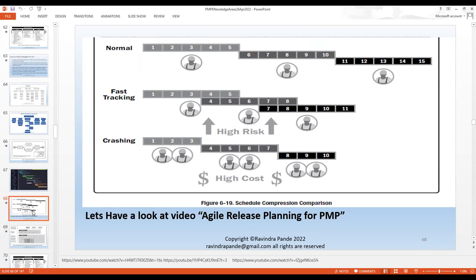Crashing means you add multiple resources so that the task gets completed in half the time theoretically — practically it will get compressed about 30 to 35 percent. Why less? Because even new resources on board take time to learn, get access to the team, understand how ports are deployed and how the product will be released. They may eat into the efficiencies of older resources as well. So crashing is another method we normally use. Now let's understand the difference between these two as seen on the Gantt chart.